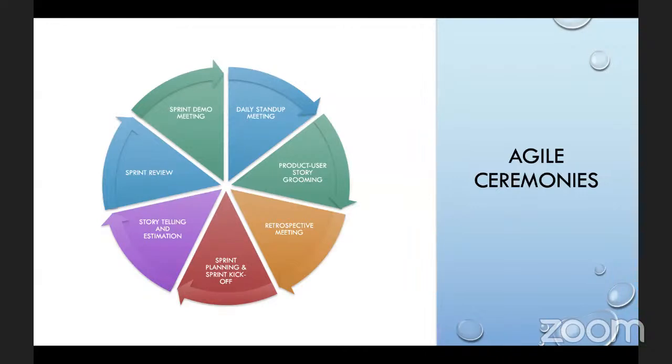But even if they don't know, and it's all a brand new team, there is a technique that we use, and we have a reference story that we always use, and the team will be looking at that reference story, and that is how we'll be able to start estimating stories for the first time. And also, if the team is a brand new team, we need to establish some of these pillars like sprint velocity, story point estimation.